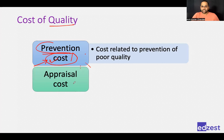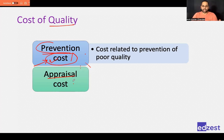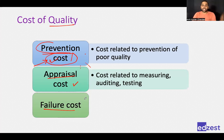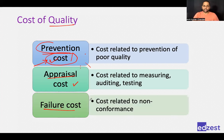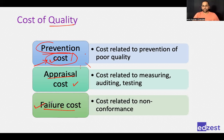Appraisal cost is whatever amount is spent during quality testing or quality checking. And then there is failure cost — when you realize something has already failed, you will have to correct it, remove the defects, and take corrective actions. Those are your failure costs. These three types — prevention, appraisal, and failure — are the cost of quality terms we should know, as they will be discussed in the exam.